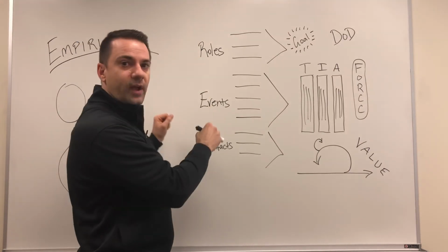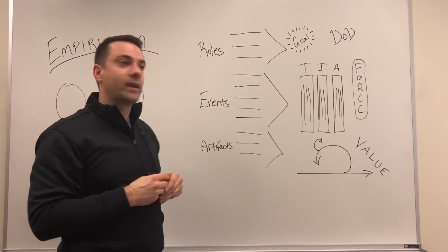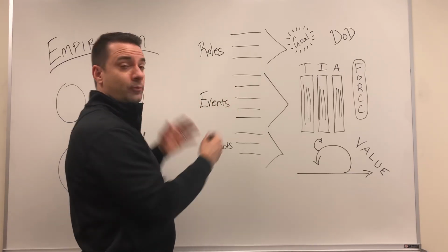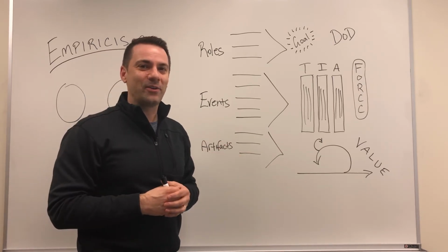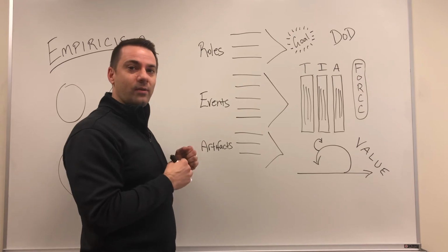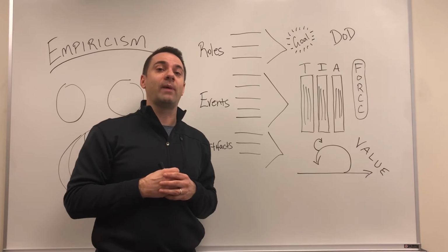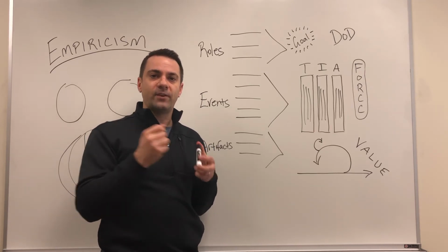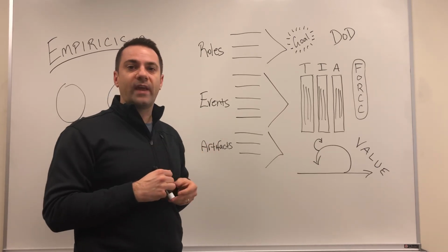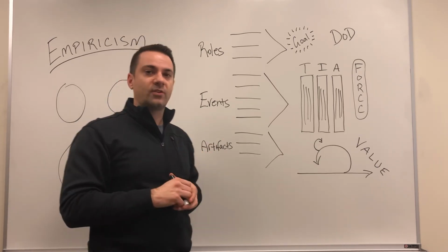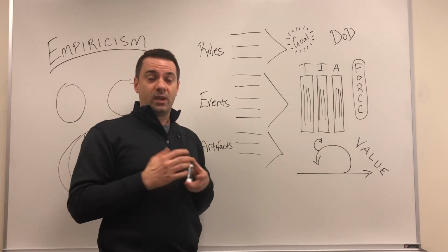They started doing their refinement. They broke down those product backlog items into smaller items, more manageable, and that also helped with prioritization. And would you know, we delivered more value because we were able to break that work down. We had space to work, and certainly we had a better ability to prioritize the backlog. It was another really neat physical, tactical way of learning and seeing what experiment we can run and what that outcome would be.